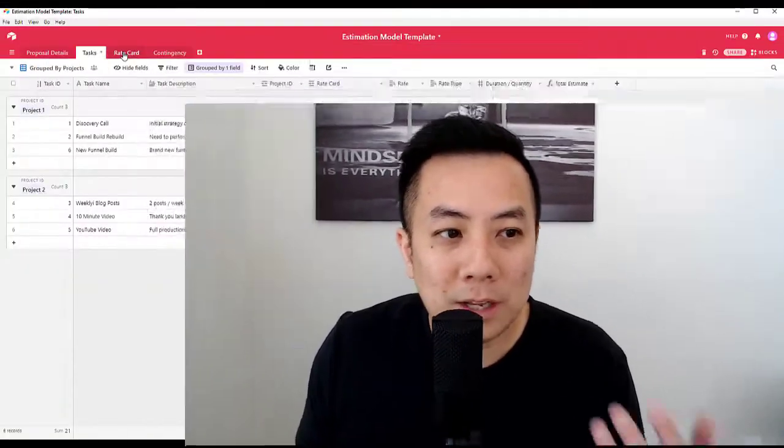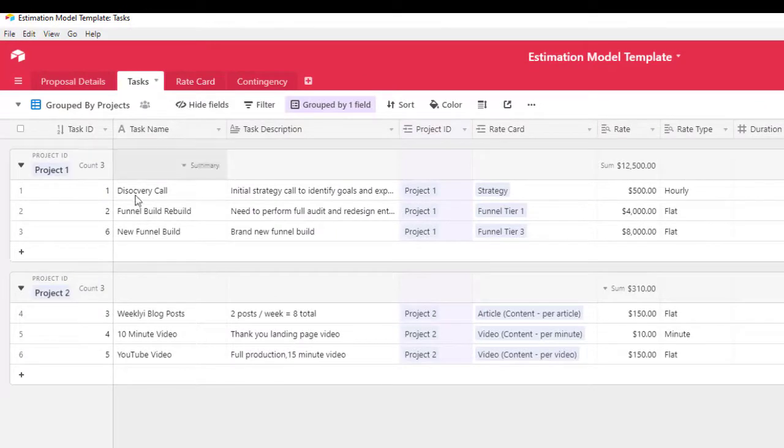And having the list of tasks that is very specific, and if you report on this, you can always show it to your client that this is your scope of work. Anything outside of that, they should be aware and expect that, hey, you're going above and beyond, and that you can justify adding on additional work to the project and then give them a quick estimate how much that would cost them. So let's say you're in project 1 and you were given an additional work, a new task.